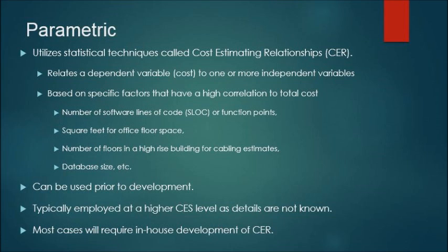Parametric utilizes statistical techniques called cost estimating relationships, CER. It can be used prior to development. It is typically employed at a higher CES level as details are not known. Most cases will require in-house development of CER.